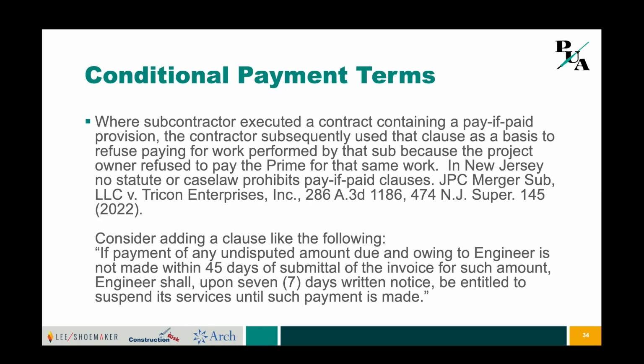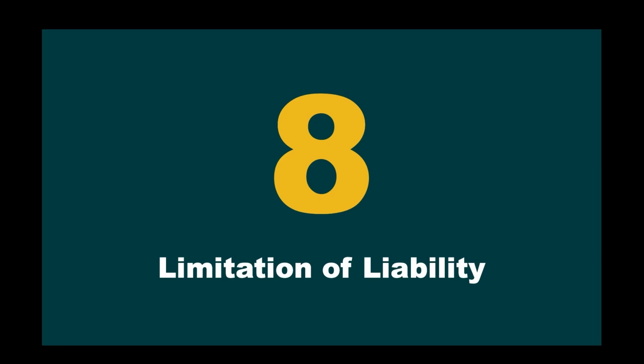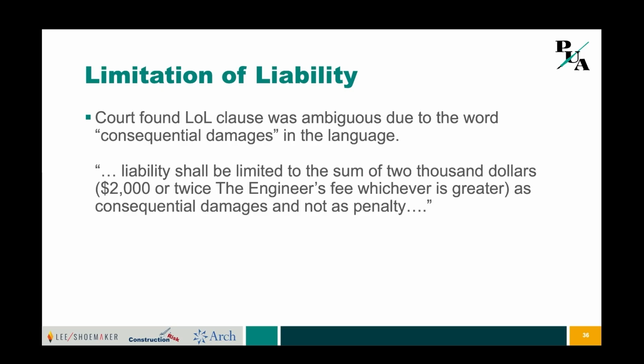Our next topic is our limitation of liability provisions. I hope many of you include limitation of liability provisions in your contracts, but do courts actually enforce these provisions? Absolutely, they're enforceable. So the issue is, if you're a commercial entity, most of your contracts are going to be with another commercial entity. So a court is going to look at two commercial entities and say you both had the ability to be represented and have a good contract, and they'll enforce it.